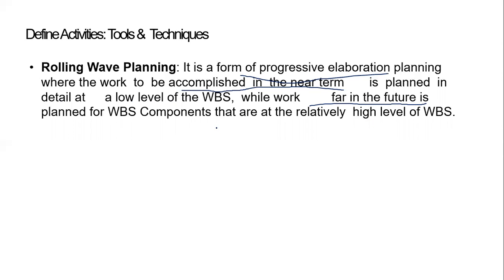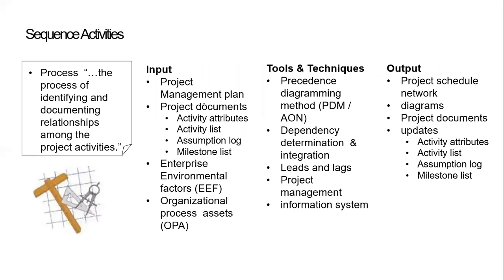Let's say, okay, we'll do the design or we'll do the deployment, but what activities are there in deployment, I don't know yet. Right now let's focus on design. If we complete that correctly, then go to the construction or build, and then go to deployment. Deployment is so far in the future, whereas my design is pretty much near future, so I can do the WBS. WBS is nothing but a work breakdown structure, which is the output of the decomposition.